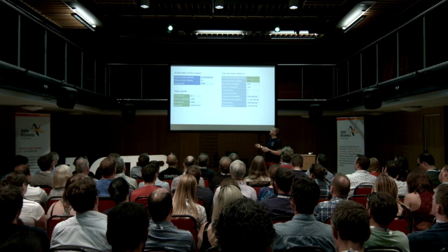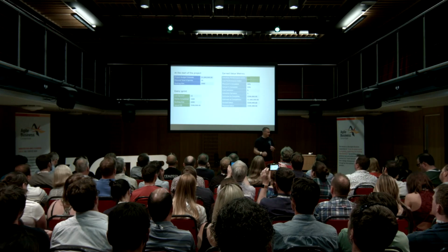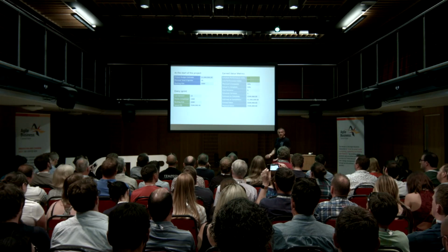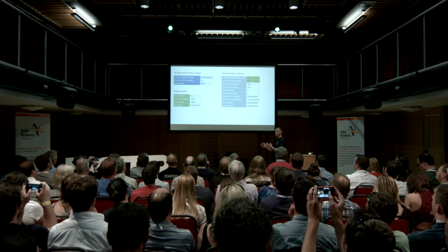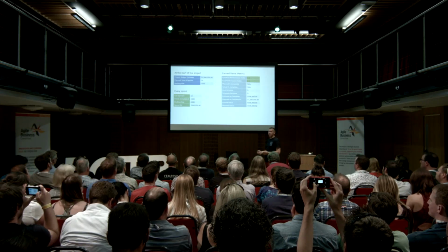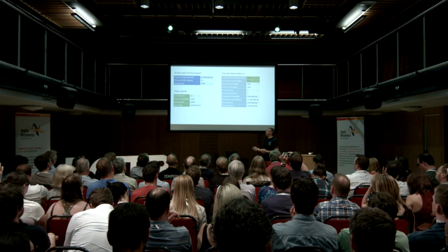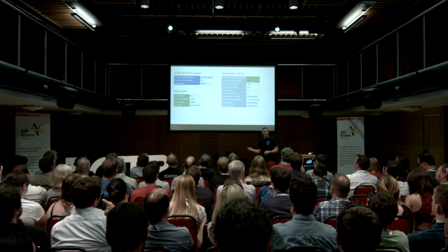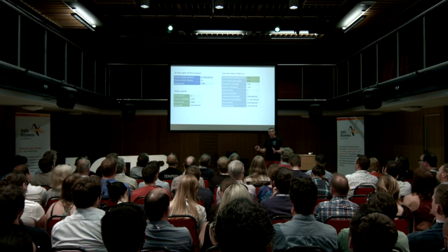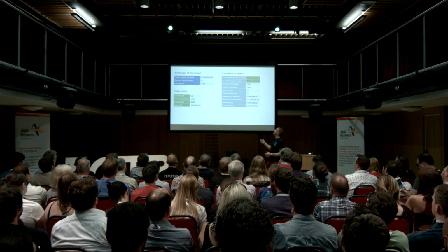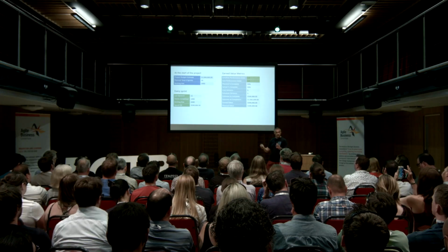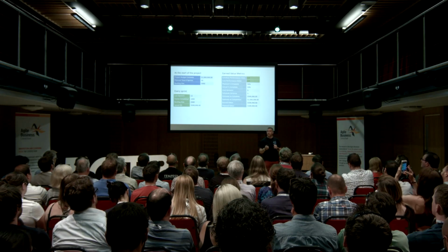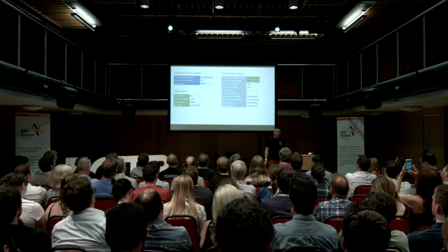And then once you've got these two bits of data, you can calculate your earned value metrics. So this is obviously an example for demonstration. So this is a perfect example. We're here halfway through our 30 sprints. We've completed 1,000 points out of a total of 2,000, and we've spent $500,000 out of a budget of $1 million. So we're bang on target. And our CPI and our SPI numbers are both 1, full green. It's predicting we've got another $500,000 to spend, and everything is looking lovely.